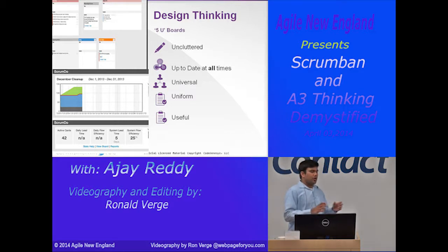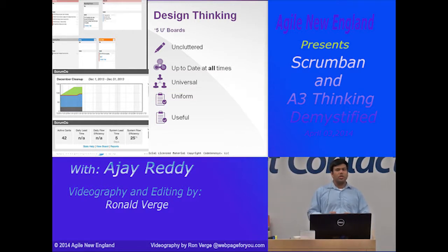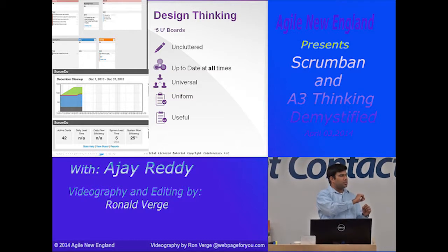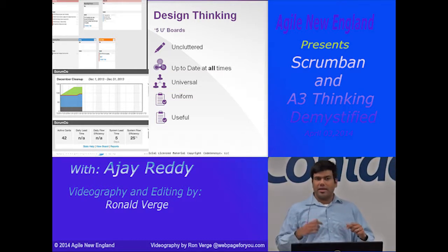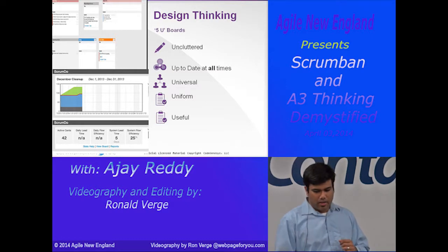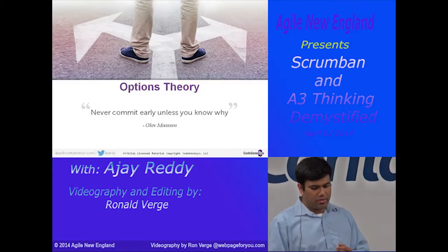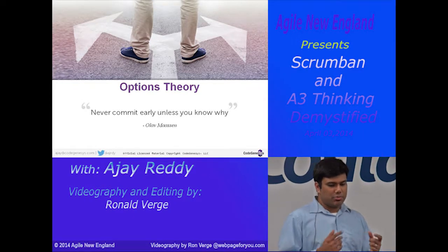This particular one, the uniform aspect. So if you have multiple systems within your organization, each one has their own system, board, and they are having similar type of patterns within that system, try to match the same visual design principle in each of those systems. Allowing them to evolve, yes, but try to make that visualization similar. Because especially when there's lots of churn in systems and people go from one system to another system, it's easier for them to engage. Again, this brings up the whole human psychology agenda of Kanban. Make sure it's useful. So lots of tools have that personalized dashboard and balanced scorecard idea.